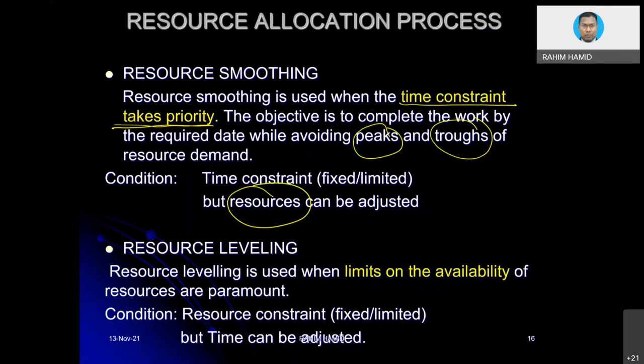So in some situations, when we want to add more resources, the cost might be a little bit increased. But that could be compensated with the concept that time is of the essence. If the time is much more important, a little bit of cost increase would be within our limit. That should be okay. Okay, resource leveling, as I mentioned, resource is the one that we fix or limit, whereas the time can be adjusted if permissible.